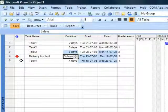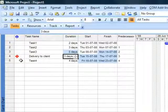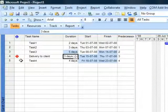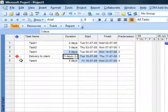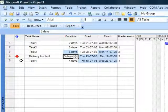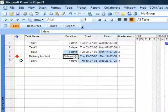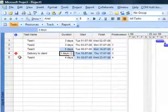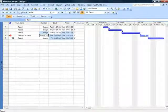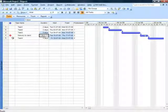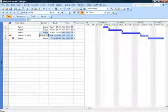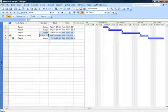So now that I proactively know some changes have happened in my schedule, I will make sure that I crunch my schedule or make more people work on it and deliver that particular deliverable to the client as per the committed date. This is how deadline dates can be used to mark committed dates in the project schedule.